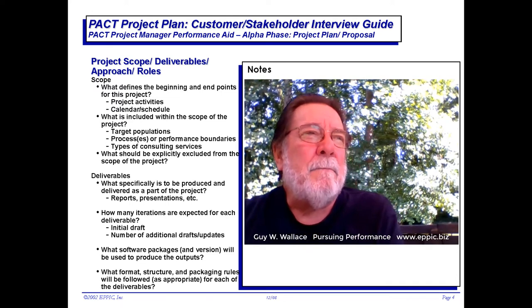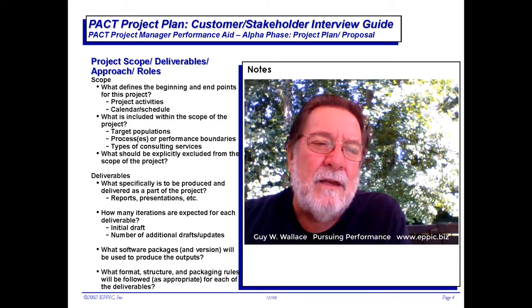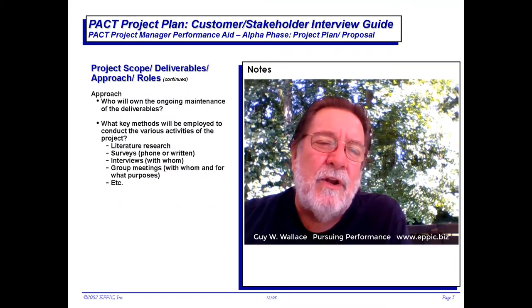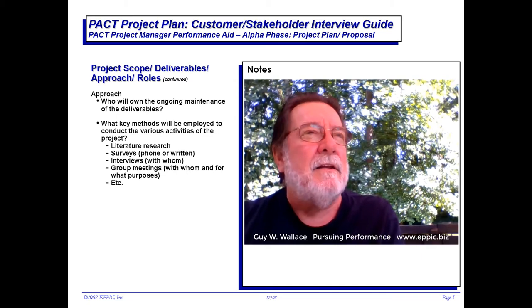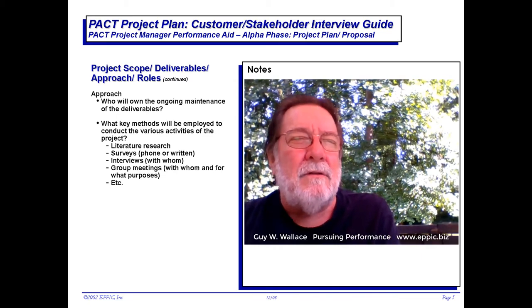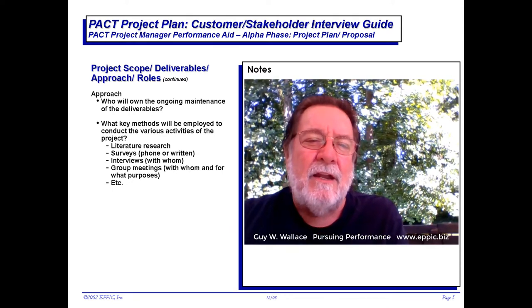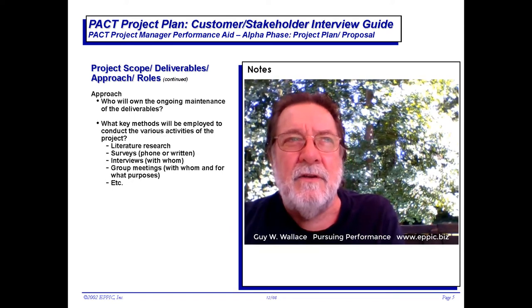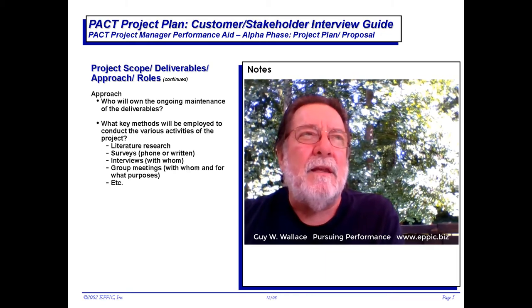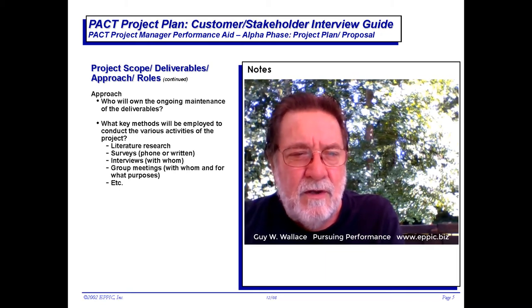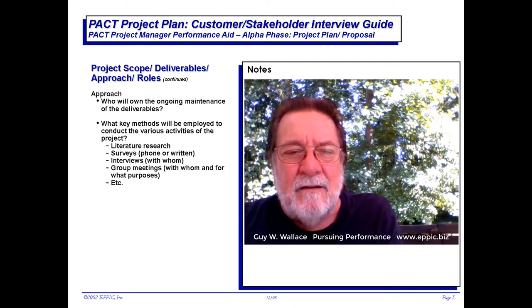Is there software, tools, and equipment involved that we need to understand? Who's going to own the ongoing maintenance of the deliverables? Is that part of the scope? If it's volatile content it will need to be maintained; if it's stable content, that's less of an issue. There are not only first costs to develop instructional content of any mode or media, but there might also be lifecycle costs associated with this, and we want to understand those.